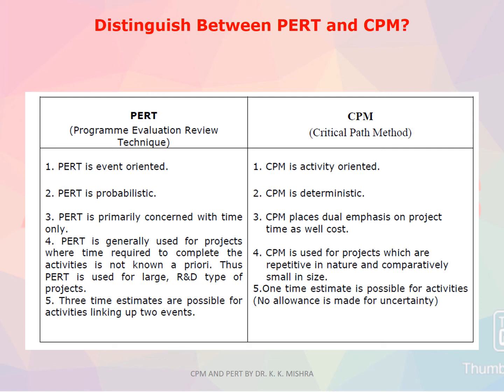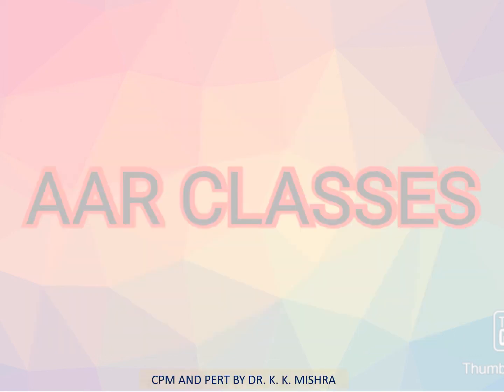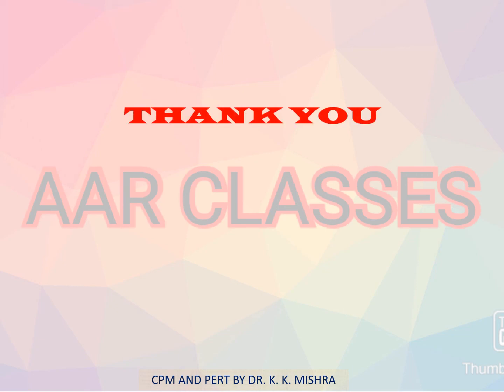Three time estimates are possible for activities linking up two events in PERT. In the case of CPM, one time estimate is possible for activities. No allowance is made for uncertainty. That's how we have completed this theoretical view of the topic.